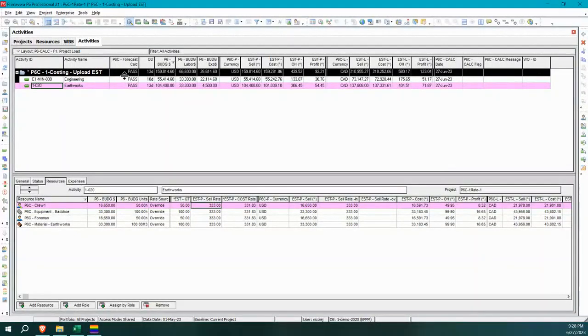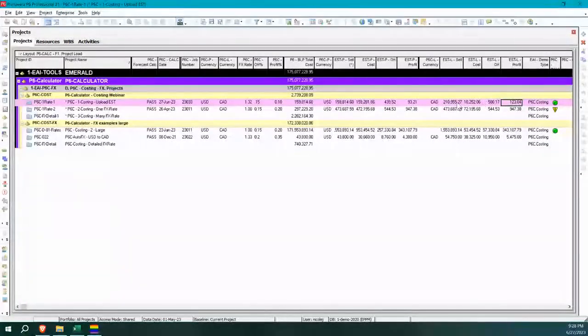Okay, so this finished running. So it should be doing my US dollar as well as Canadian dollar. So you can see it here. This is the total. In Canadian dollars, this project is 210,000, but the sell that we agreed with the client is 159,814. Now our cost, if we strip out the overhead and profit, is 159,281. So it's a small dollar amount in this example. And we've got the same overhead and profit being calculated in Canadian.